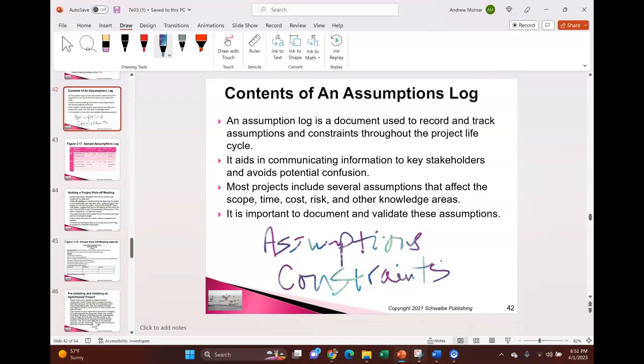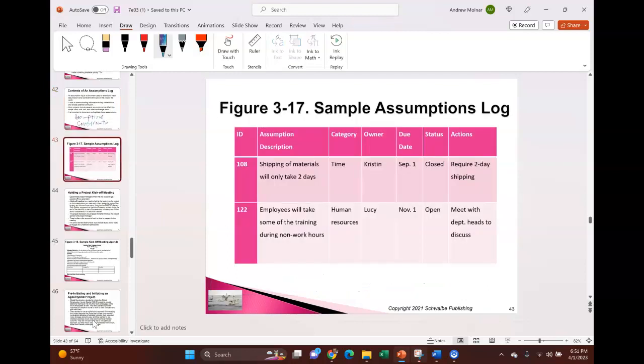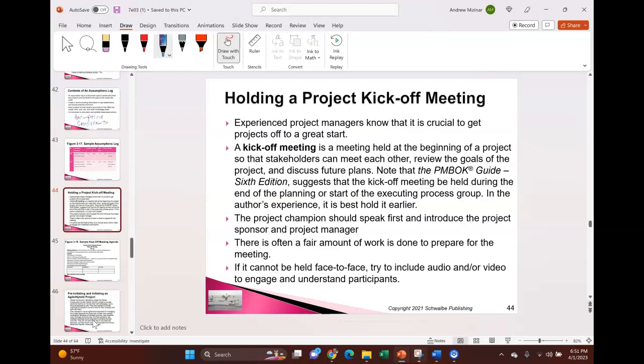Every assumption in the end, I usually move to my risk register. Assumptions are risk. Anything that's assumed true without proof, that's a risk to me. And so here's a sample assumption log, right? Notice you give it an owner. I think that's a very important point. If people buy a name, never put an organization as the owner, put a name. Who can I tap? Okay.